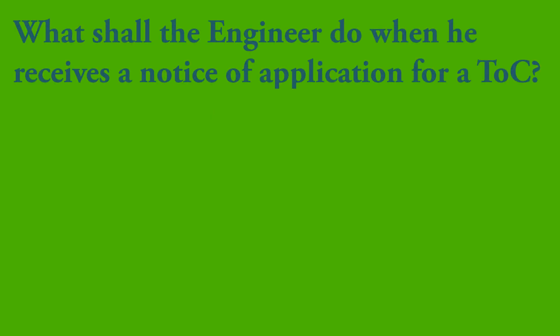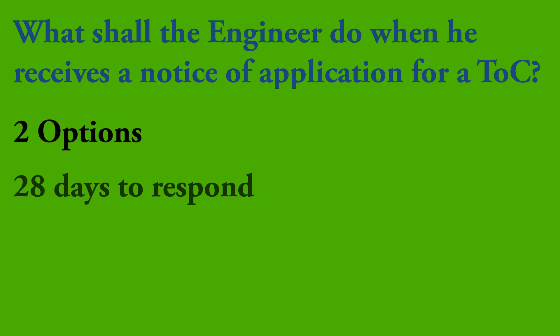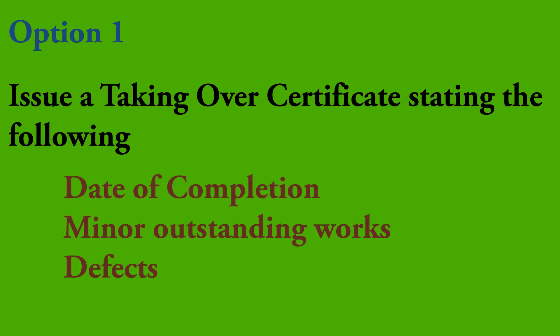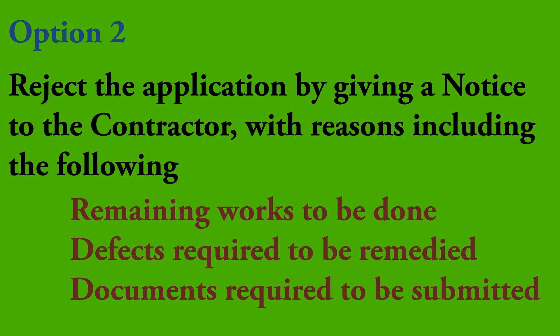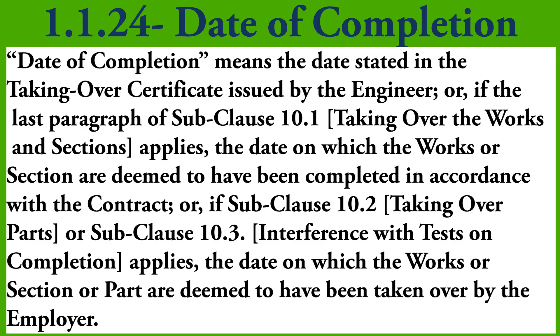Now we'll look at what the engineer shall do when receiving the contractor's notice of application for a TOC. He has two options to perform within 28 days. First, he may issue the TOC to the contractor stating the date on which the works were completed and listing minor outstanding works and defects that will not substantially affect safe use. If it is not possible, he shall reject the application by giving a notice to the contractor with reasons, specifying work required, defects to be remedied, and documents required to enable the TOC to be issued.